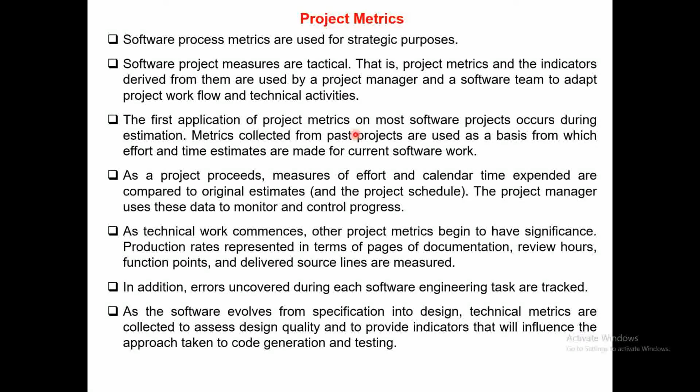A similar kind of project you might have worked upon, keeping that project as a baseline, you can derive certain metrics out of it to have your estimation done for the current project. As a project proceeds, measures of effort and calendar time expended are compared to the original estimate.